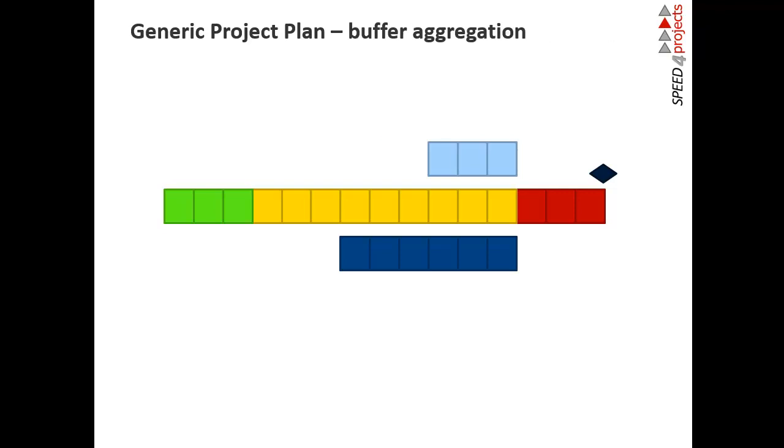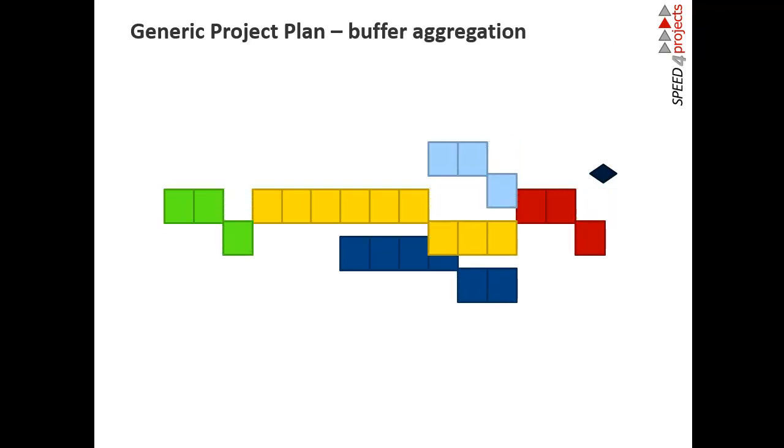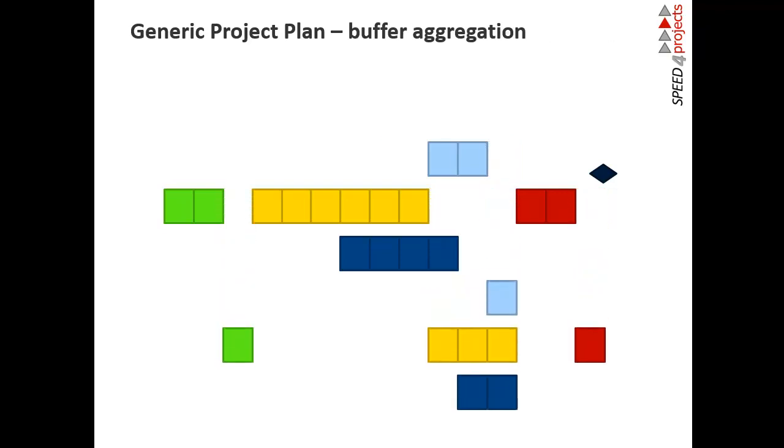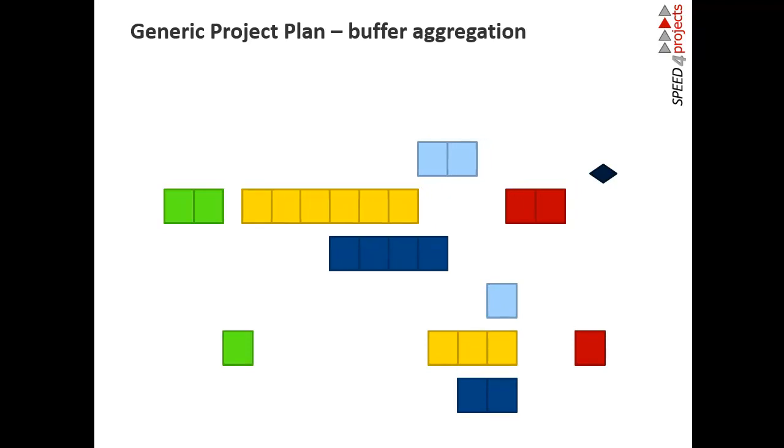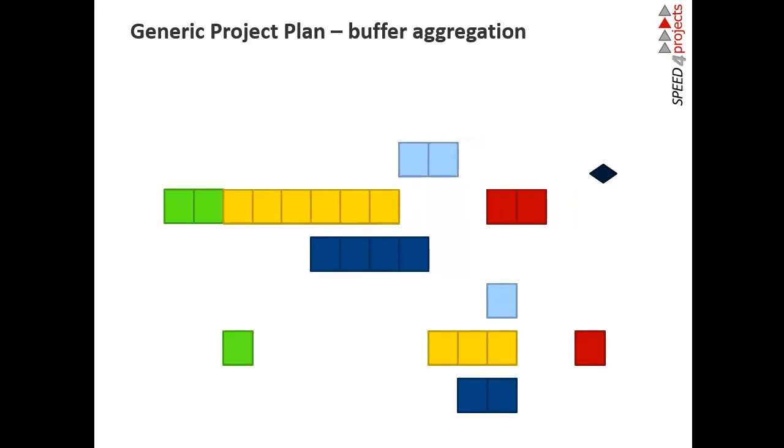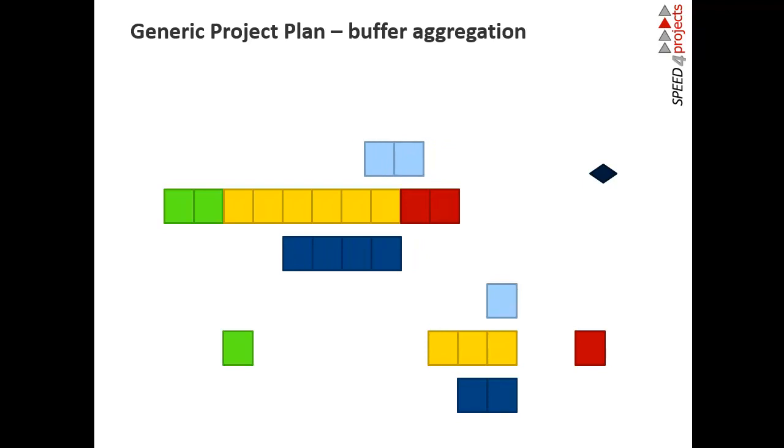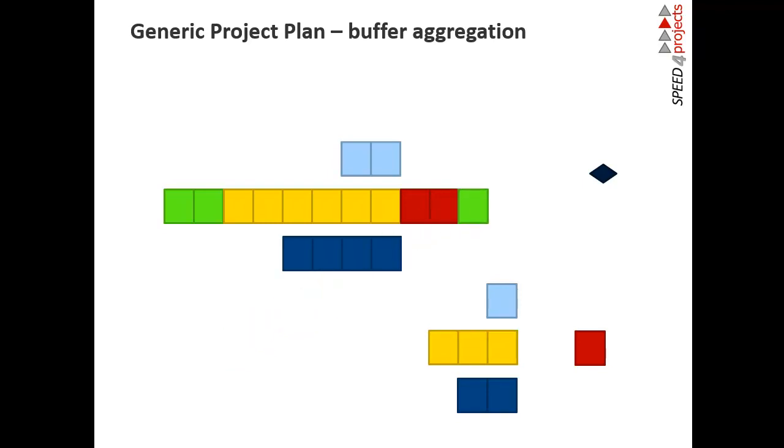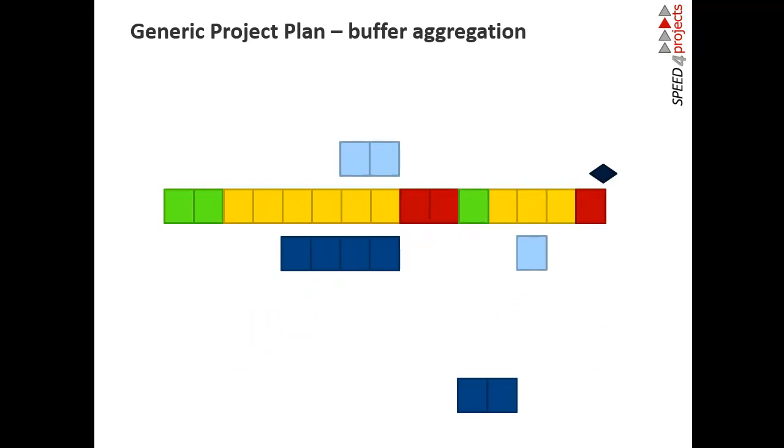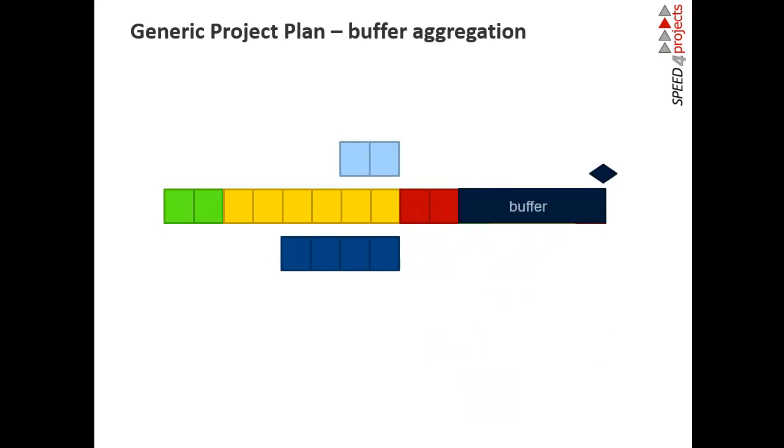What we are doing in Critical Chain, we remove all this one-third of buffer, and of course the project plan is compressed. So it looks like a normal project plan again, the same structure, the same dependencies, but only two-thirds of the duration. And all the rest we are putting together in the project buffer. That's all what we do.